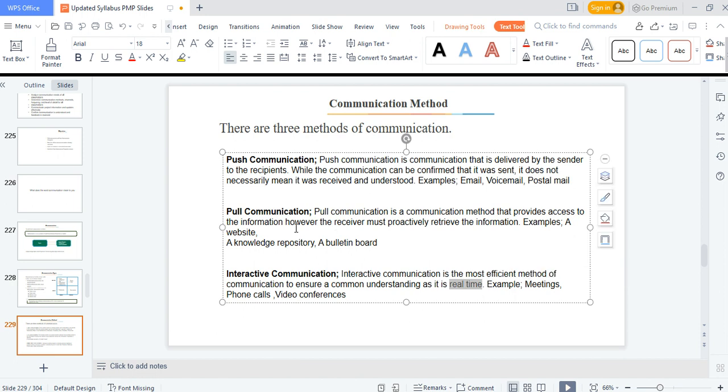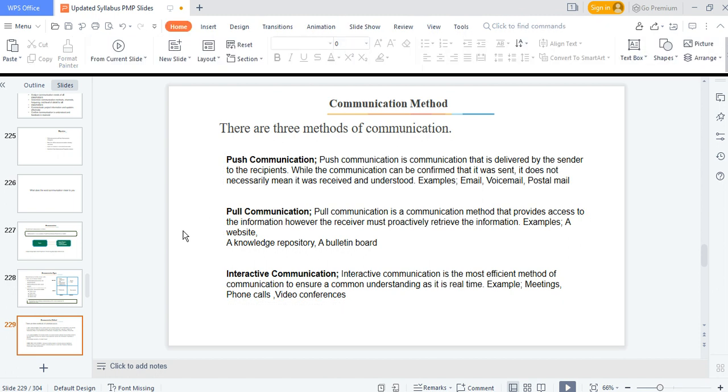One of the things we did since this was not working was we just initiated a video conference through Zoom and did a pre-recording of the entire handover and sent it over. They received and vetted it, and within less than 2, 3, 4 hours, we got a reply that everything is okay, we can do everything, and within 24 hours, we were able to hand over, and the balance payment for the job was paid. That is the power of interactive communication.